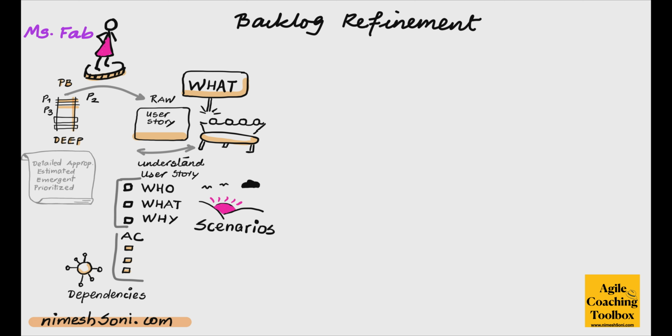She can write these scenarios, these are the business scenarios, using a language known as GWT. That refers to given, when, then. So essentially, given a precondition, when a certain action is performed, then the product should behave in a certain way. So she would have captured those scenarios as part of the user story. If she has not captured them, at least she should be able to walk them through these scenarios while in the backlog refinement session. So remember, this is going back and forth.